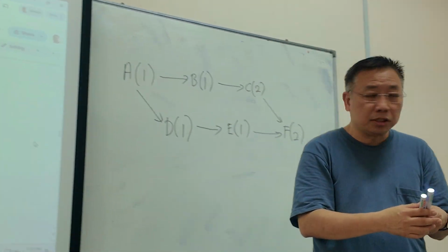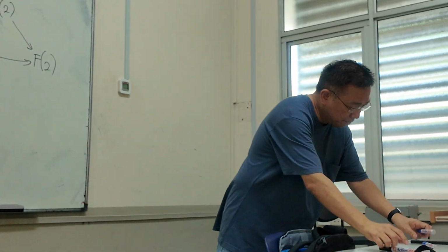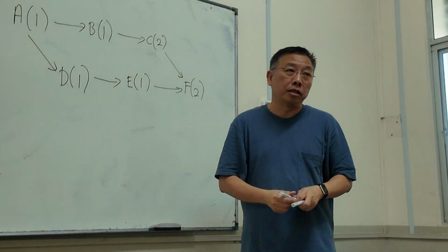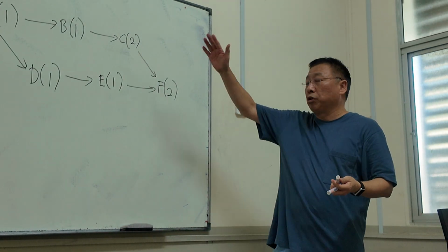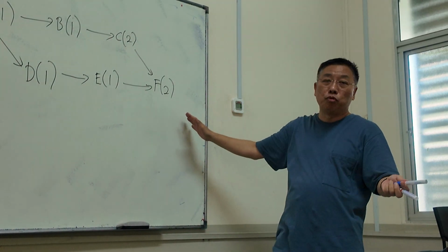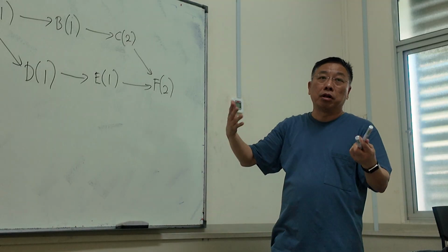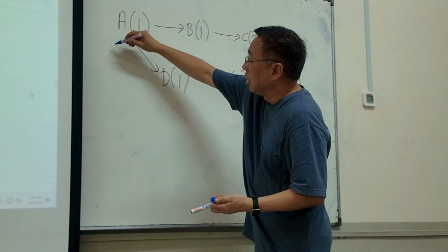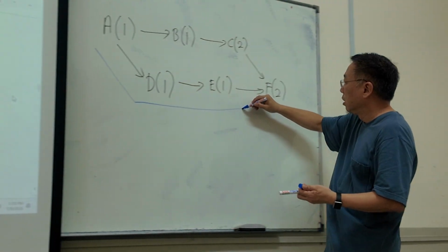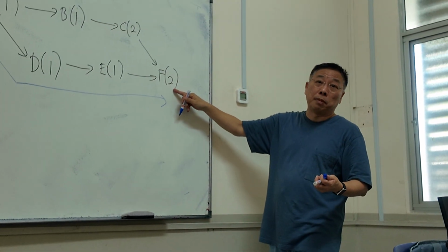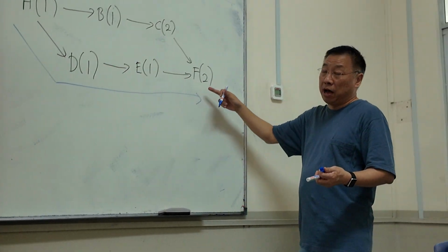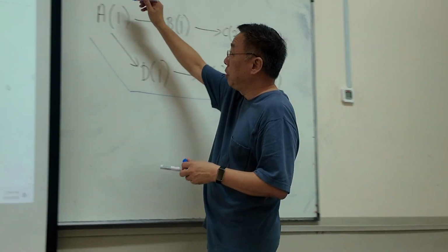Okay? So let's use my blue color pen. Don't know which one is newer. Okay, so the way you calculate critical path is to go through the path, the many different ways possible, and see how long they are. Okay, so the easiest way, the one path I can see very clearly is here, right? Because this is the last task, right? So this is the way to complete the project. This could be one path. Another path is this way.